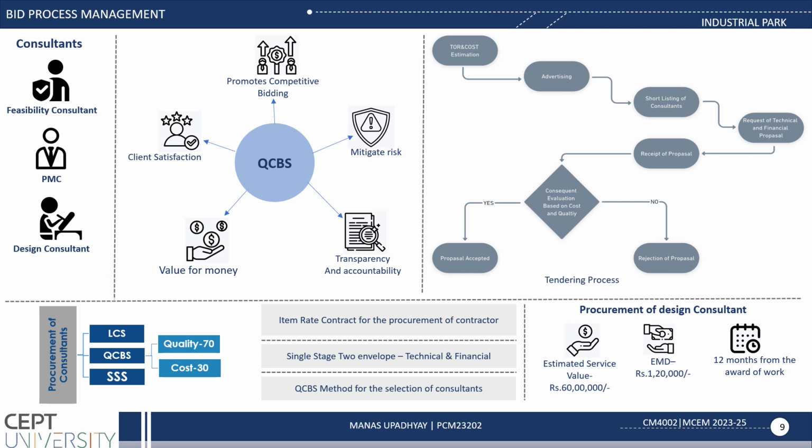This is the tendering process for hiring the consultant. First, we estimate the cost of the project, then we advertise. After this, we shortlist the consultants, then do the selection based on the cost and the quality. After this, we provide the tender to the consultant.